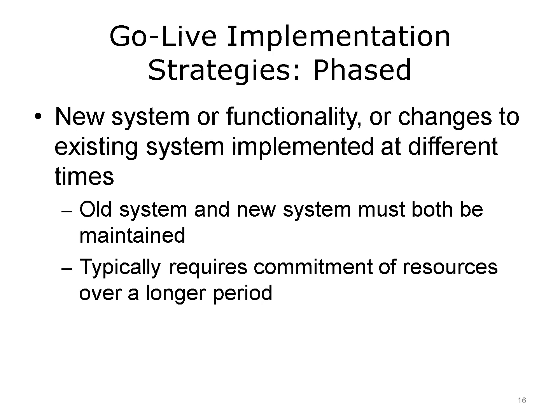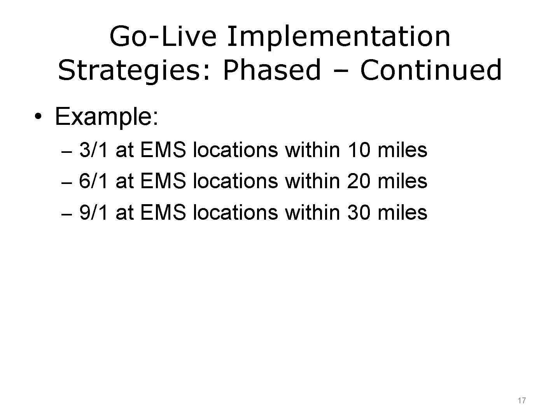In our example, if the goal for the IT department is to ultimately remove fax machines and associated phone lines, then the implementation of the EMS mobile application using a phased approach would require the support of dual processes for an extended time period. IT would need to continue to support the current process of faxing EKGs to the emergency department and simultaneously support the use of the secure mobile application.